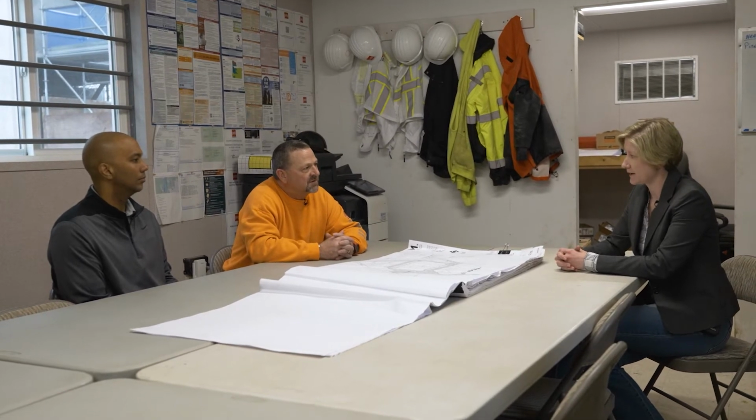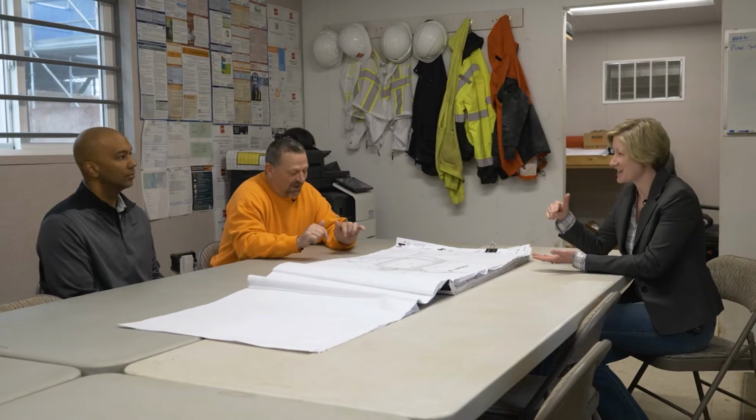And then at the end, once you've got the roof structure up, tied in, we'll start backfilling and then we'll pour strip around the building. Okay. And a lot of times we'll see utilities and low voltage, things like that. All your electrical will get in there before we start backfilling, so then we don't have to dig for him. So he's already got a lot of that in already. All right. It's a good rule of thumb to always check that space if you're going to be putting in, say, a dock after the fact. Yep. Make sure you're not running into any utilities in there.